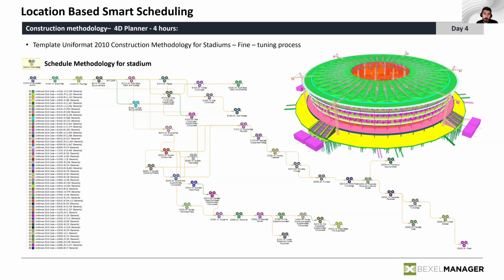And here, again, we were lucky that we have a lot of experience with stadiums. This is not the first stadium we built. So we already have a predefined methodology structure for stadium buildings of this type. We reused the knowledge from before. We simply imported one standard schedule methodology for the stadium, repurposed it and customized it a little bit, of course, for the specific needs of the project. And we used that as the basis for the schedule.